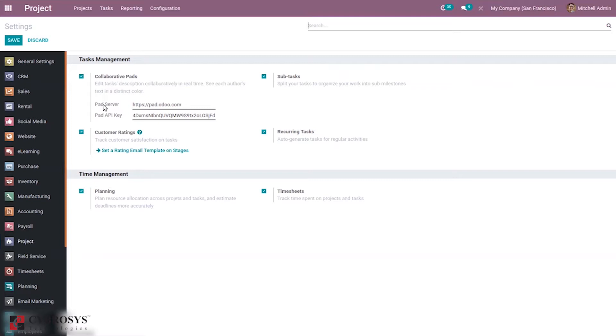You can set the pad server and pad API key here. You can also split tasks into multiple sub-tasks to organize your work into milestones.